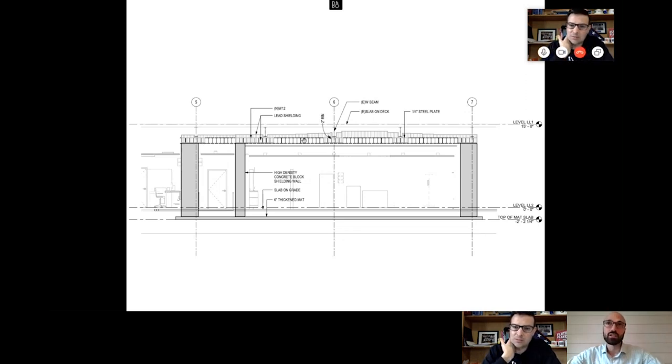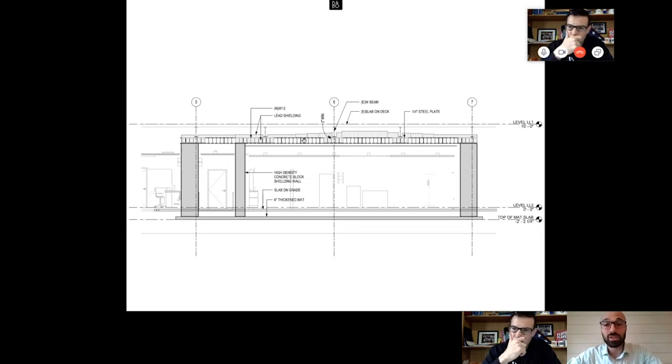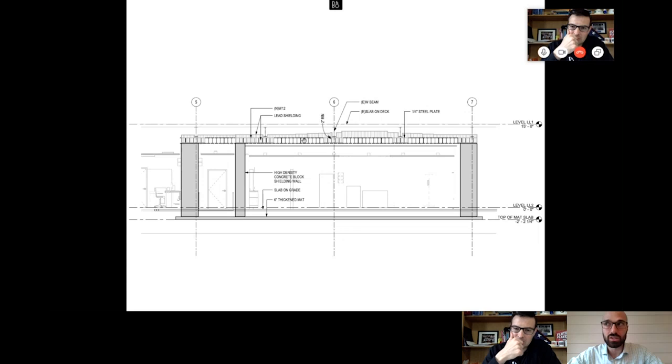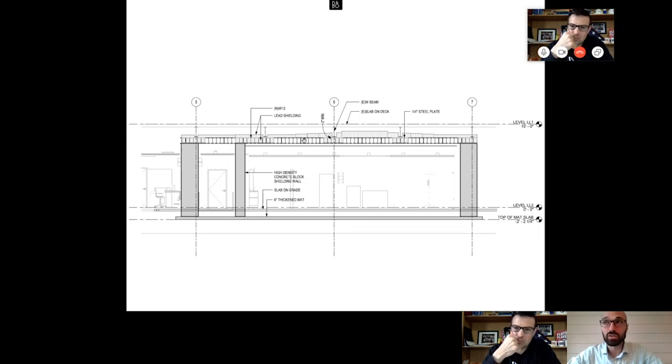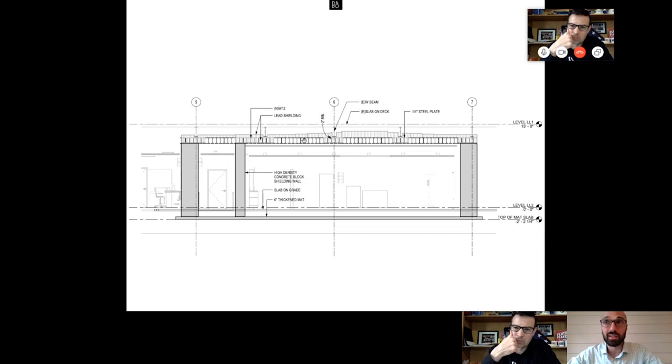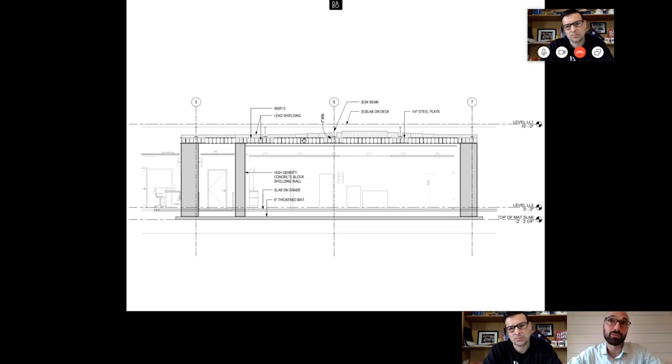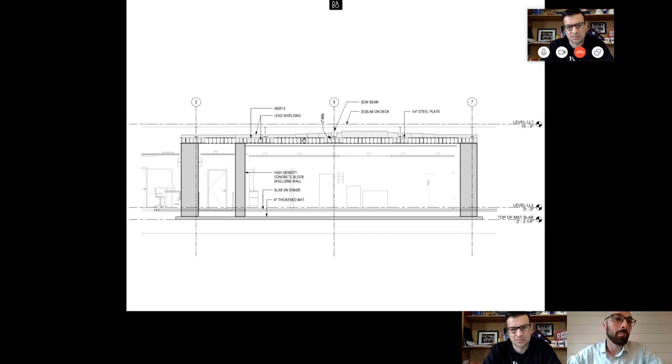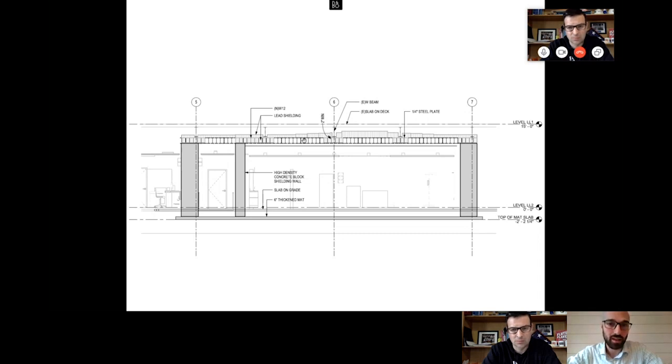It's a 28-foot span. We were two stories below grade. So the only way to get the steel down there would have been to either take an elevator out of service and pass lengths of steel down the elevator shaft or to bring them down the elevator in 12-foot sections. So each one of those beams would have had to have been fully penetration spliced down in the space twice. That led to a massive bust in the budget. It was around 30% over budget just because of all of the labor involved with getting the materials down to the site.